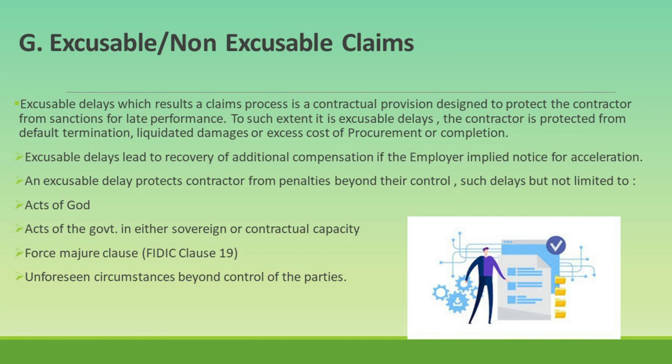Non-excusable delays, on the other hand, are delays for which the contractor is responsible. These could be due to poor project management, lack of resources, or other factors within the contractor's control. Such delays typically do not provide grounds for claims or additional compensation, and can lead to penalties or damages. Properly documenting and justifying excusable delays can protect the contractor from unfair penalties and ensure that the project continues smoothly despite unforeseen challenges.